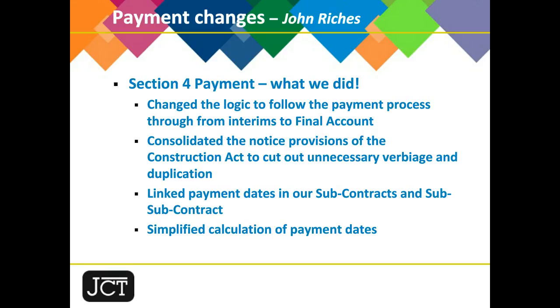There's no calculation in doing it, straightforward. If the parties choose to leave that box blank in the form, the first payment date is 1 month after the date of possession. If you start leaving those sort of boxes blank, you're in trouble with these contracts. You must fill the boxes in.